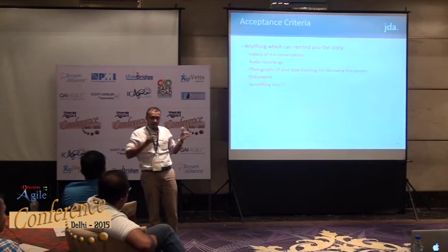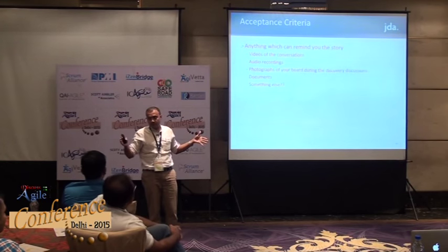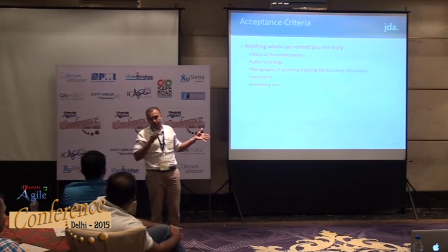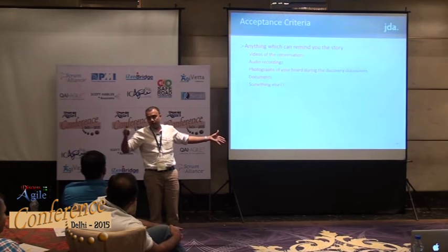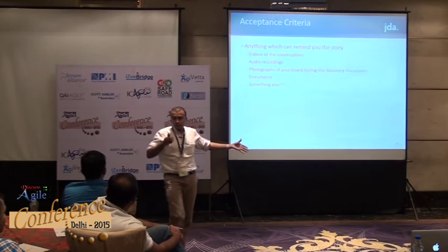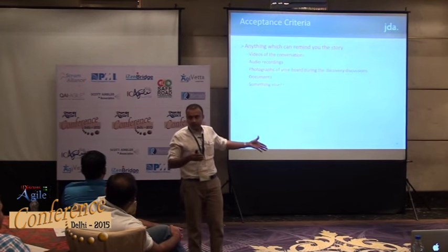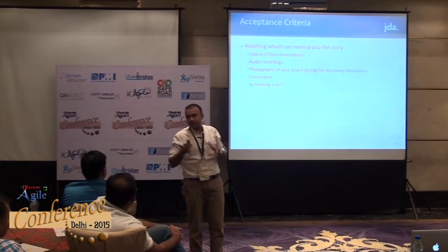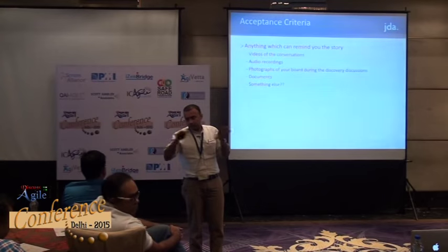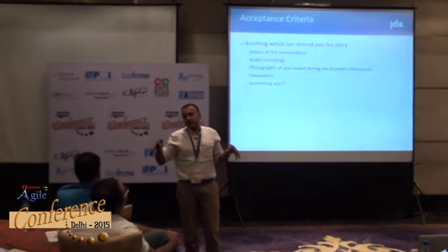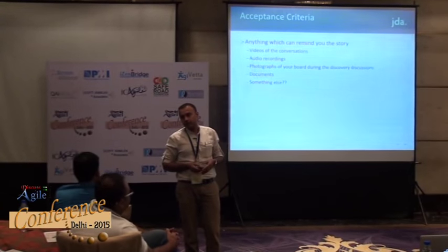The idea is, if I am doing a two-week iteration, and I have a story which is going to go beyond 1 week, it's more or less going to overflow, or take the whole iteration, or they will do the development only by the day before the demo day, and then testers don't have time. So if you have testers, depending on your context, you have to define how it's going to be.